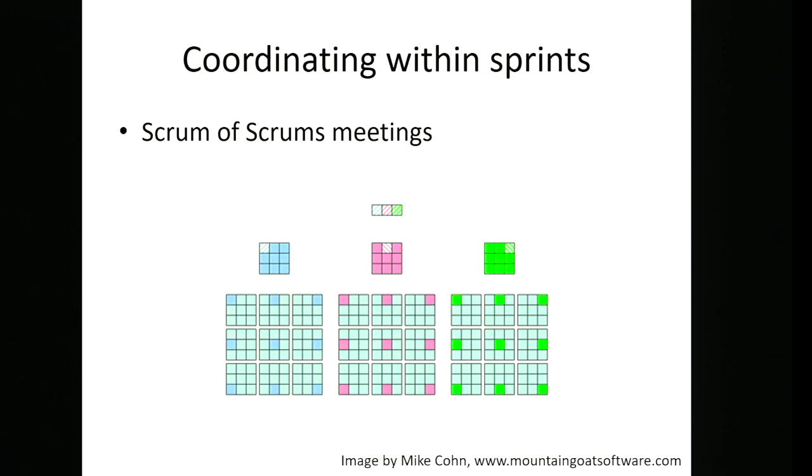So we've got, say, a product team here, which is actually split into 9 agile teams, and you might take one each from these stand-ups to then go and have a stand-up amongst the whole product, and then you might take one each from those to have a whole stand-up for the entire thing.